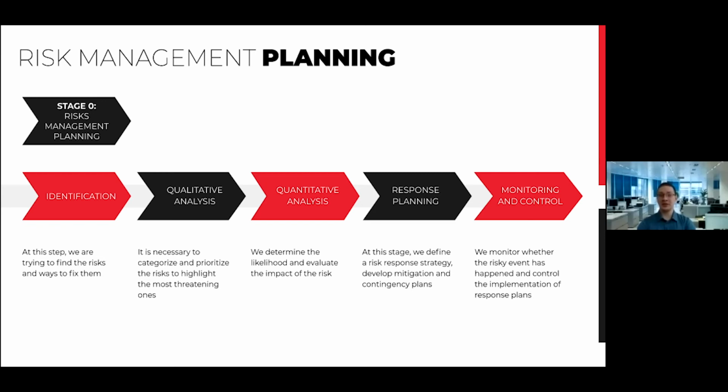After the identification, it must be analyzed. The raw part that must be done for all identified risks is qualitative analysis. Is this risk positive or negative? Is the probability high or low? Will the impact be big or small? Answers for these questions will allow us to prioritize risks.